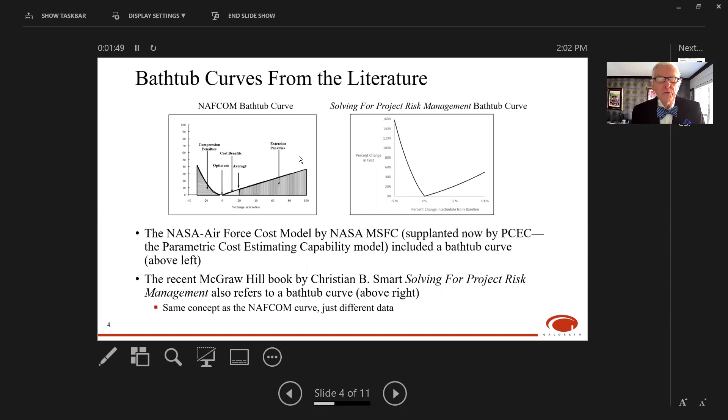The first bathtub curve is on the left from the NAFCOM model, a NASA Air Force cost model that's been replaced by PCEC—the Parametric Cost Estimating Capability model developed by NASA Marshall. The old NAFCOM model had this bathtub curve. There's a recent book by Christian Smart, Gallarath's Chief Scientist, called Solving for Project Risk Management, which also refers to a bathtub curve shown in the right chart. Same concept, just different data.